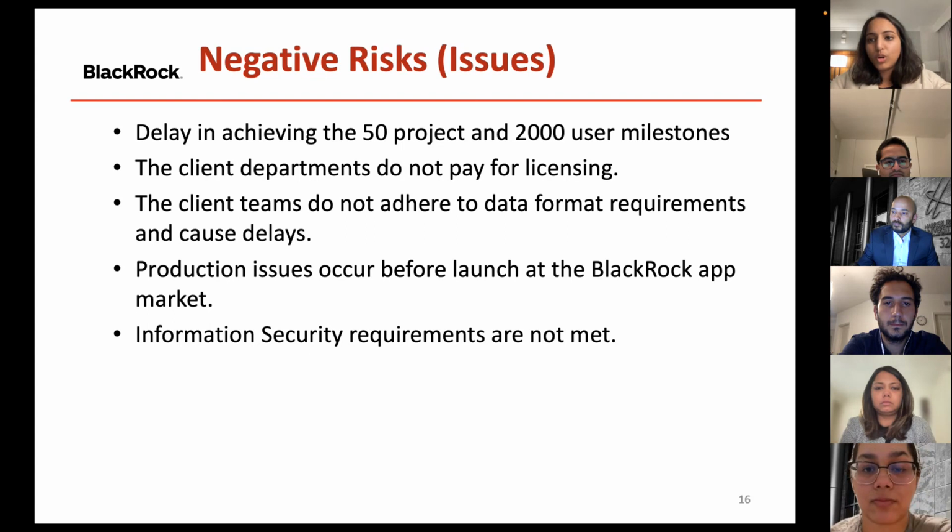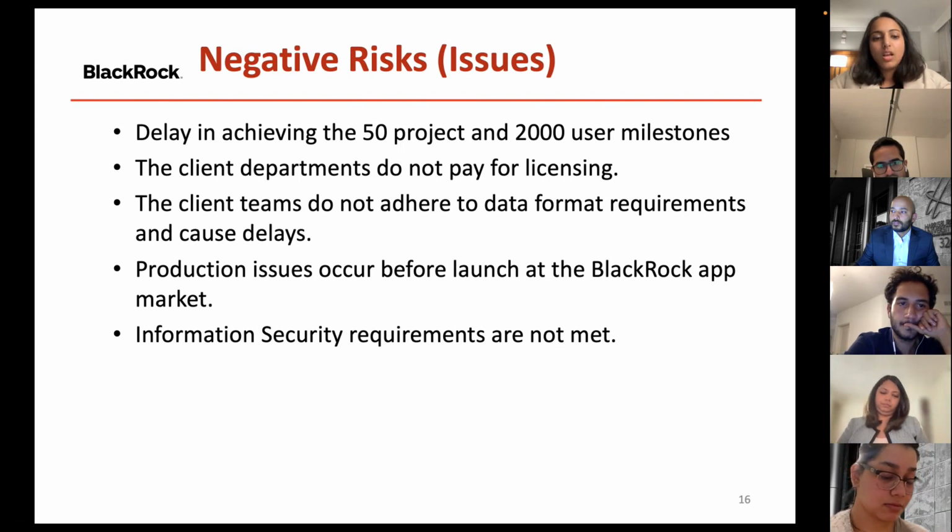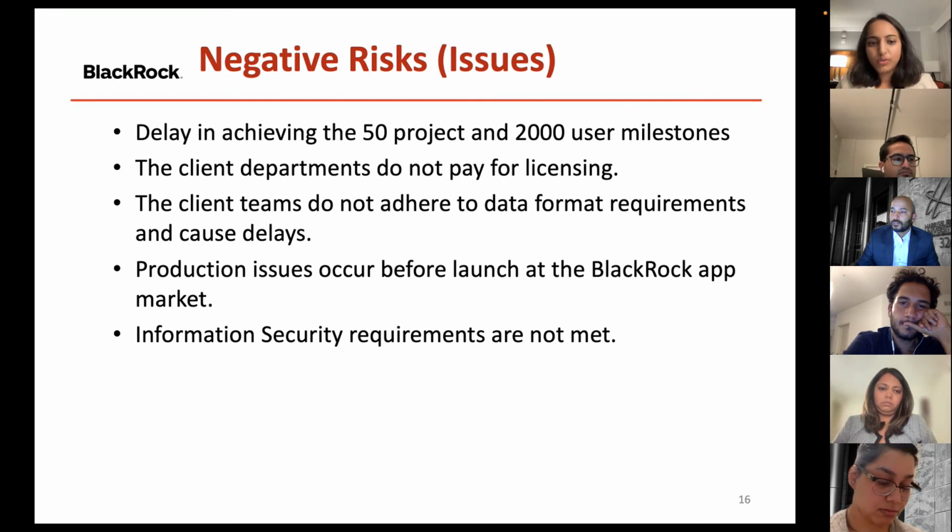Client teams may also not be able to provide or may not adhere to our rule to have just data that would be clean and formatted. So that could also create delays, and we would also have to address that. Next would be there could be production issues when we try to launch this on the BlackRock app market. So that could also create delays, and Microsoft will help us with that. But that's again a risk we might encounter in this project.